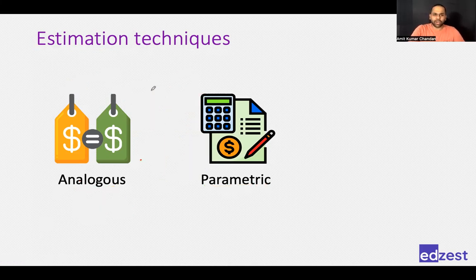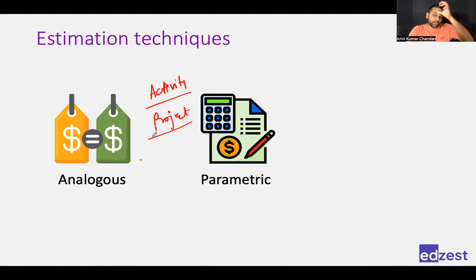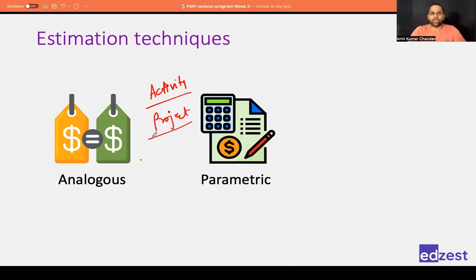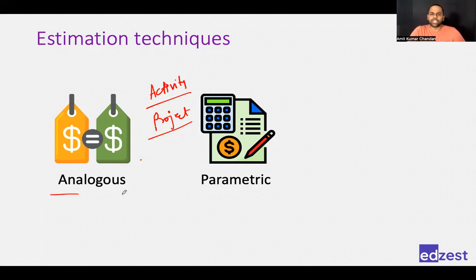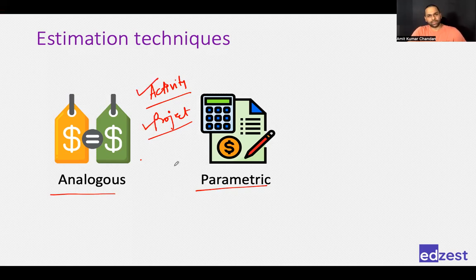Parametric estimating means using parameters available from a previous project and then estimating. This can be done at the activity level or for the entire project as well. For example, if you have just initiated the project and management wants to know the estimate, you can look at the entire previous project if it is similar or comparable.